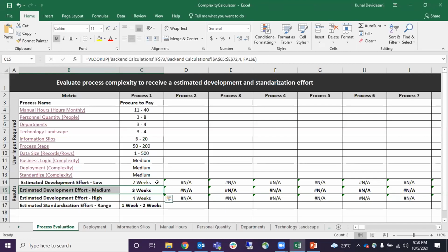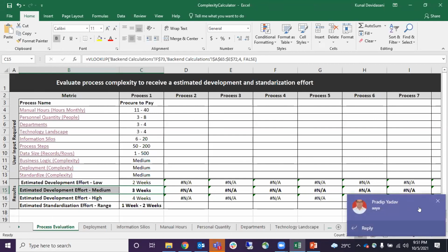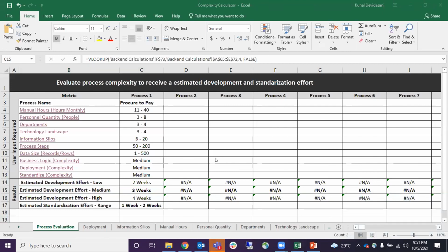Another is when we do the requirement gathering with the client, because that's the time when we know the process in a deep dive, right? We know the nitty gritty of the process, we know the process in detail, and we know how complex the process is, how many different things are involved, how many different applications are involved, and how many different business logics are involved. So basis that we determine, and we also give the final estimations to the client.